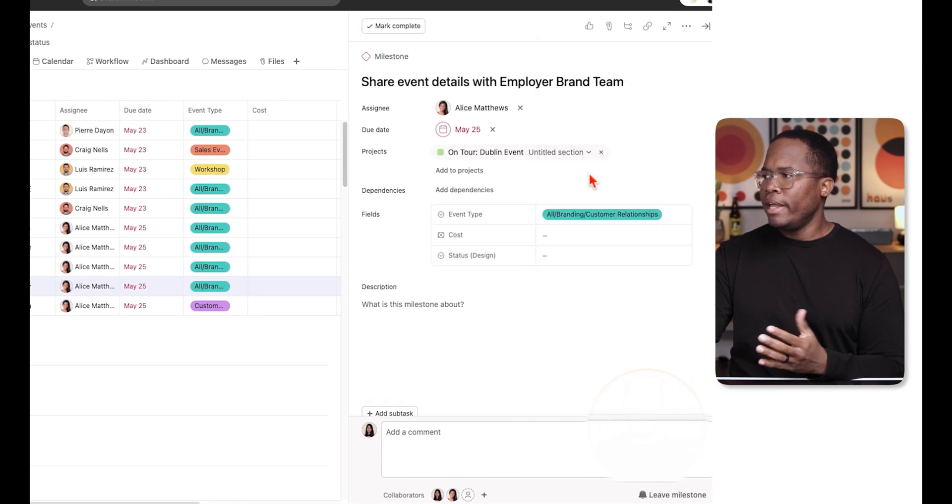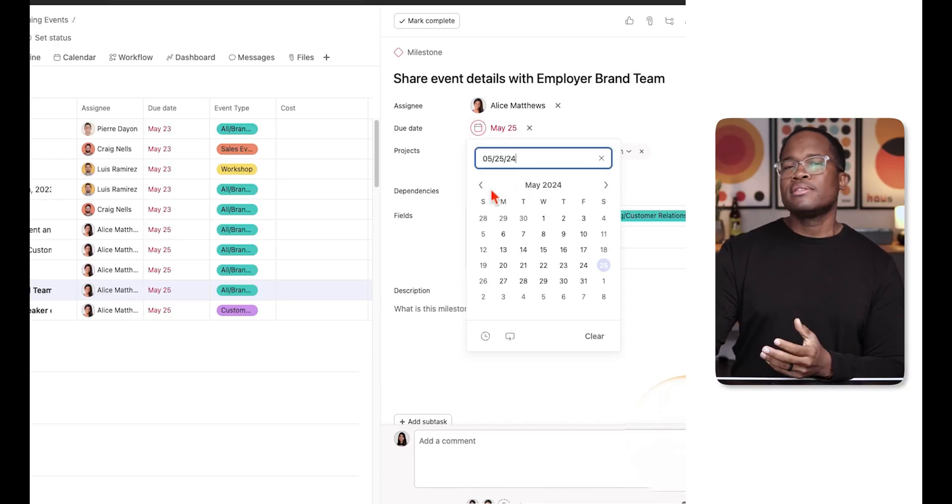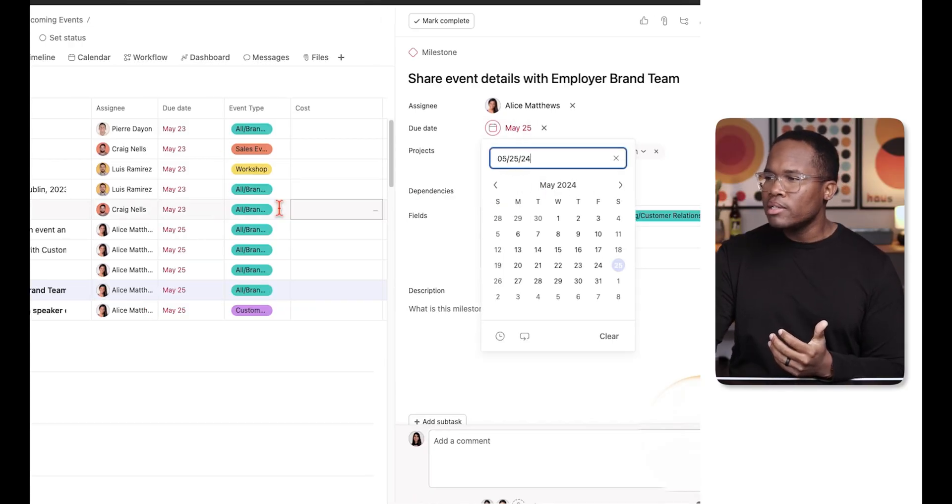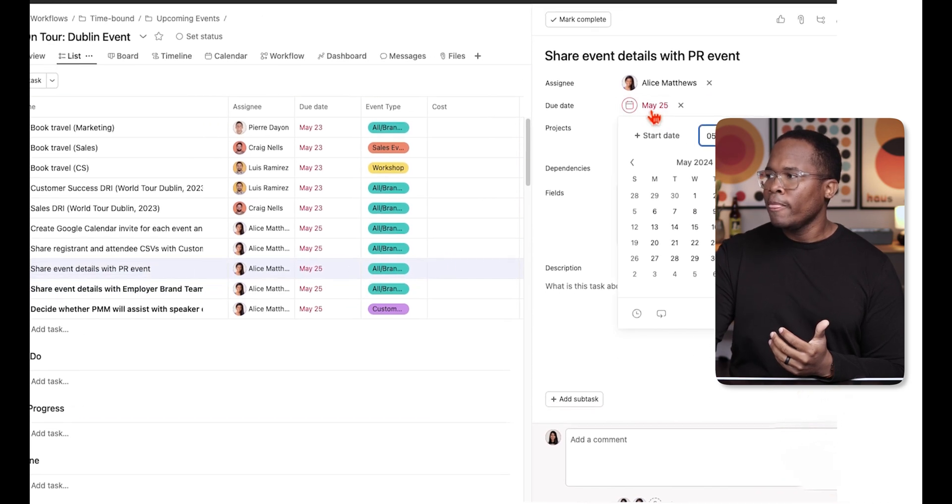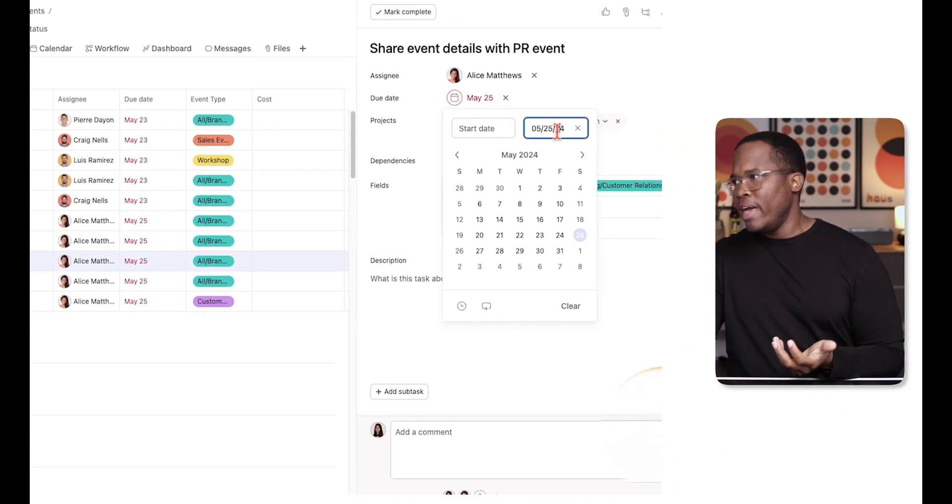What milestones allow you to do is: if you are adding projects to a portfolio or tracking goals with automatic promotion, when a milestone is completed you can see in the portfolio what milestones have been completed. The thing about milestones is they occupy one single date — there is no start date or end date. Whereas on a task you can add a start date and then an end date.